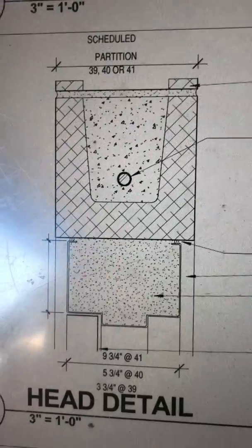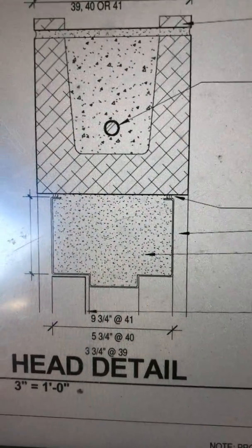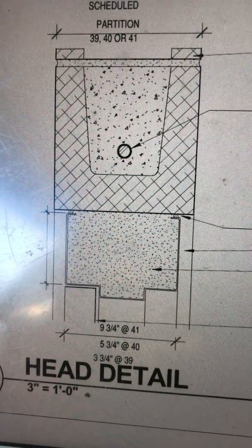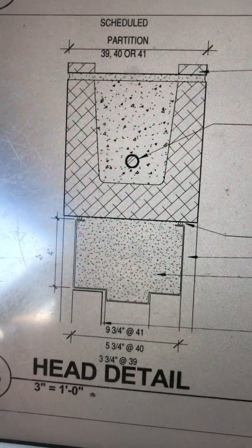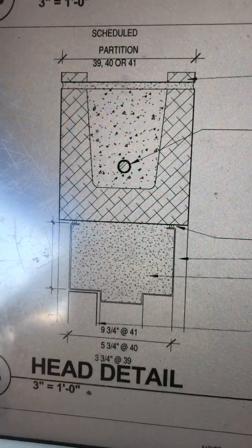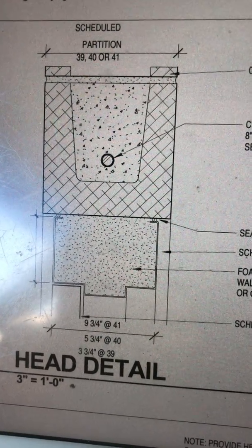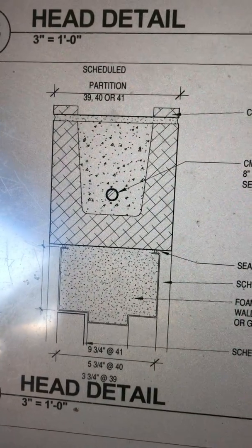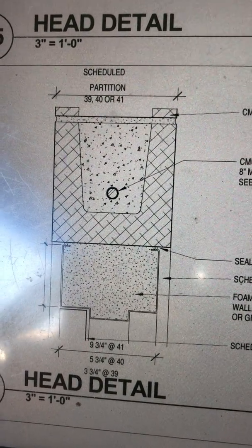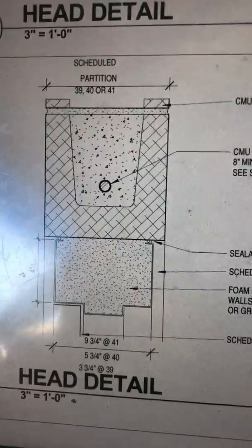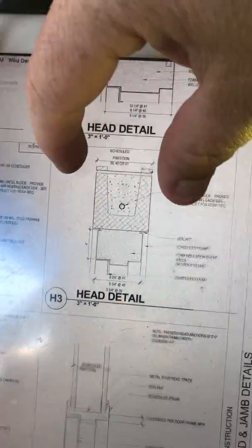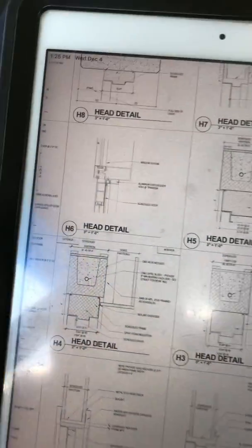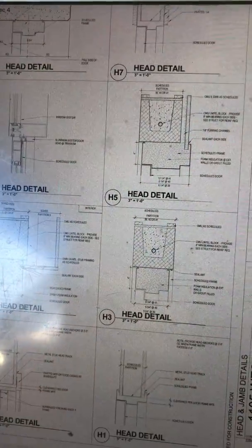And you know, if it's 6 foot, you'll have a schedule that tells you if you go 6 foot, you've got to put at least 2 bond beams with 2 number 5s. It'll be on your plans, your build set, your shop drawings, which will be under documents, where you go to find all that. So that's it on the partition walls and the door schedule, which is pretty simple stuff to do. So it's very important you know those 2 things.